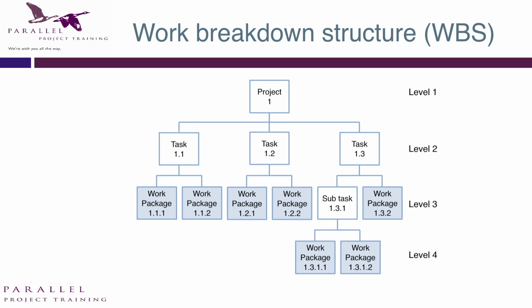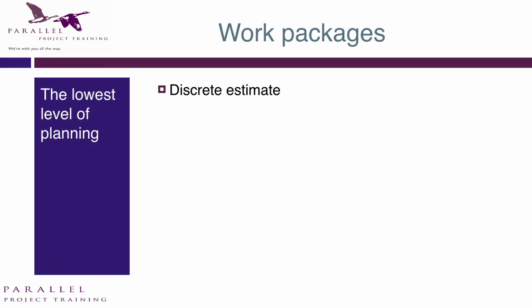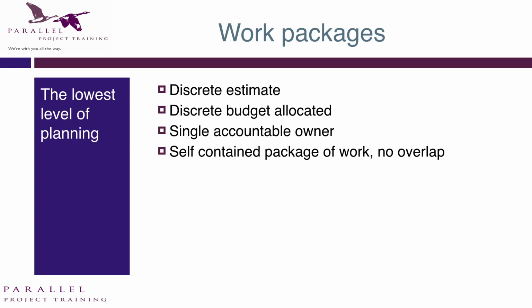So you won't necessarily see one-to-one correspondence between your work breakdown structure and your product breakdown structure. So I've talked about work packages a bit. It's a discrete part of the project. It's got a single accountable owner. It's got its own duration. It's got its own budget.